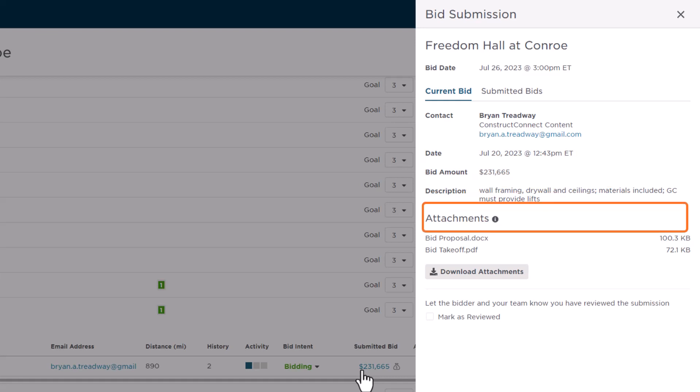A Description field also displays. This displays the description as entered by the subcontractor. So this is a good place for them to clarify their exact scope of work and to input things like inclusions, exclusions, and qualifications.